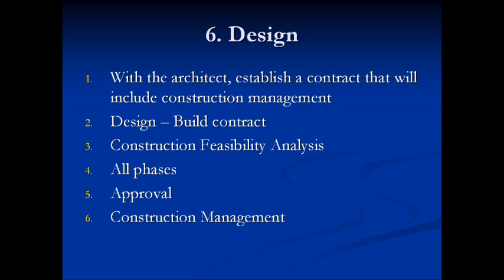The value and benefit of this is that it includes aspects of having an architectural program, building code review and analysis, talking to the agencies and governing authorities in order to ensure the viability of the project, and talking to various vendors and subcontractors that may need to be a part of the whole process. So it's like an overview document as far as the construction of the building is concerned.